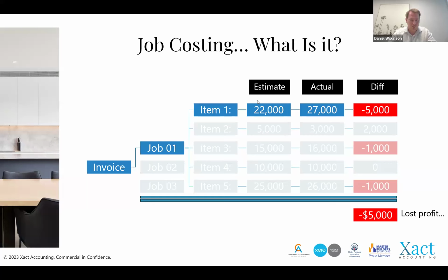Now, once invoices and costs start coming in, this is the bit where I get most excited. Probably less so around cash flows and P&Ls, but I want to know, are you defending that margin? So in that example before, let's say we have an invoice coming in for Bathroom 2 from that supplier. With the bookkeeping processes, the invoice comes in, hopefully in full and accurate, and you have purchase orders in place, which Gayle will talk about a little bit later. But an invoice comes in, and what you want to do is, in your job costing system, whether it's Build Xact, which we really love and recommend, and again, it depends on your stage, or you could use Builder Trend, or Procore, or one of those.